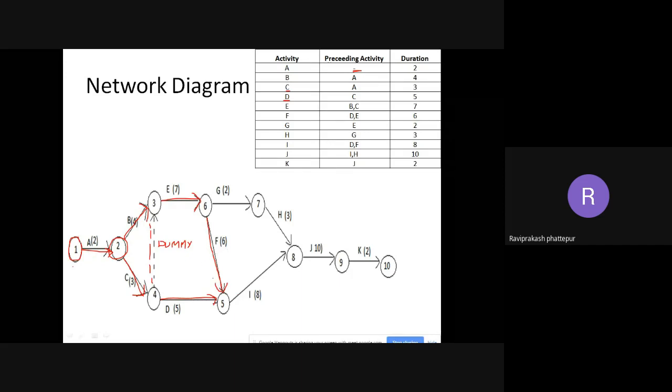So if you see this, can you tell me this F is after D and E? Okay, so that's why it is drawn a bit further. So you can draw a dummy like this after D. Okay, after D I can draw a dummy like this, for your understanding, or towards this side, then I can draw an F. So slight changes would be there, but even that is also correct, but complication will increase.